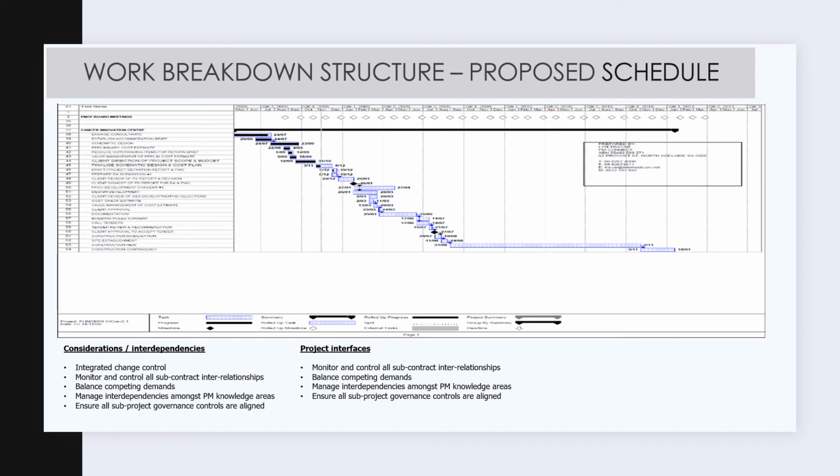Monitoring rules such as earned value management rules or other physical measurement rules or performance measurements. For example, a schedule management plan may specify EVM techniques such as baselines, fixed formulas, percent complete, rules for establishing percentage complete, and schedule variance and schedule index used to assess the magnitude of variation to the original schedule baseline. We need tools to manage the plan, progress meetings including between subcontracts, and preparing a cost plan of the program that may impact on the budget, contingency and escalation that may result.